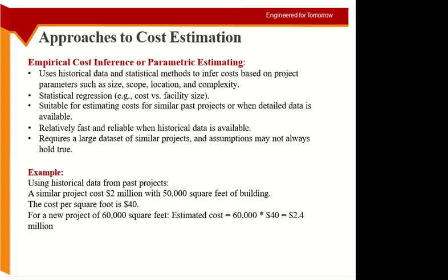Okay, and then you may have made some assumptions as well. Okay, you may say, in my project I'm going to use the same air conditioning system which they are using, but that one is old. You go into the market, you don't find it. Okay, so these are the types of assumptions you are making. Whenever you are using historical data, there are some assumptions, because those people did their work in a different way. So you are assuming I will do it in the same way and this will work for me. This may not work for you.